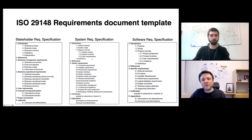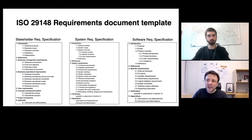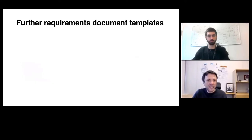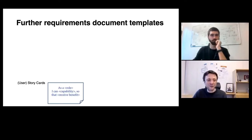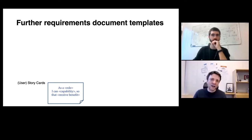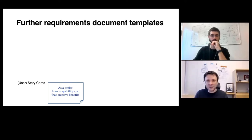In response to the lack of guidance on how to specify requirements, the research and practitioner community has developed different templates. One of these, mentioned in the context of Scrum, are user story cards — a helpful means to specify especially functional requirements, following the sentence pattern: as a role, I can achieve a certain thing using a system capability, so that I can achieve certain benefits or values.